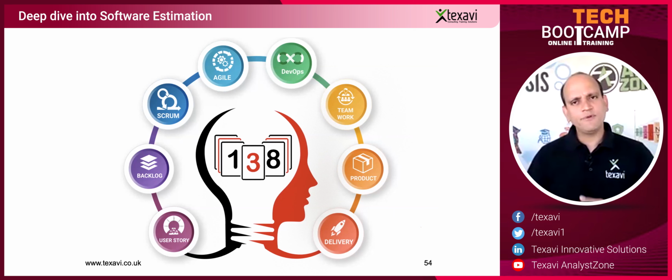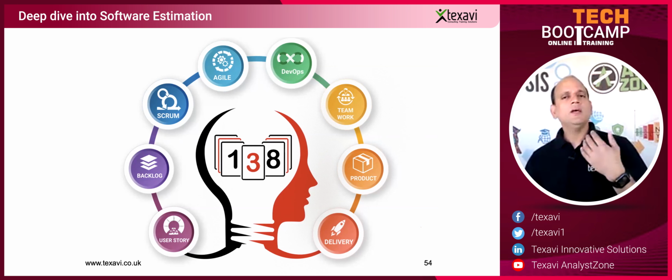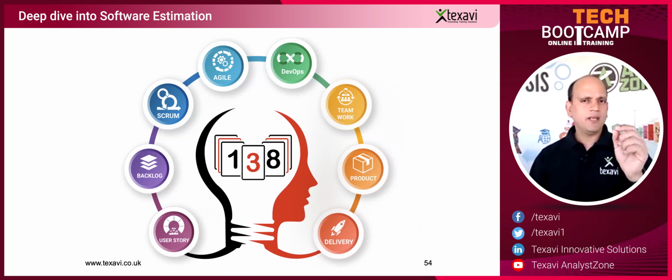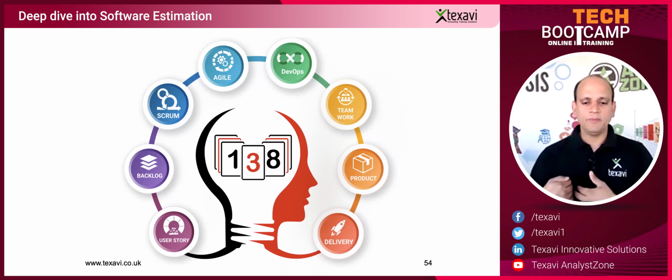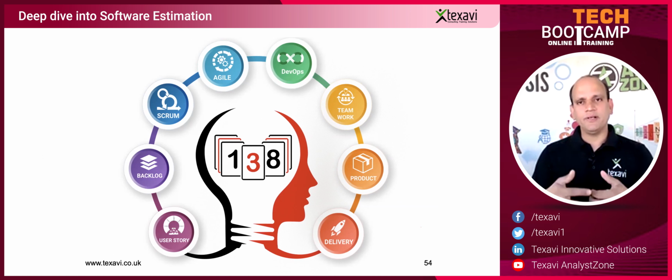As we discussed yesterday, you don't have to deliver all the e-commerce website functionality in 2 months or in 6 months. You can actually have one functionality done, and then you say, hey, by the way, I've got the catalog. You can have a look at all the items that I'm selling. You can actually select the items, create your own shopping cart. And then once that is done, you cannot obviously pay, but you can send that in an email to me. I'll look after the items that you bought. Still that works. There might be offline work involved, but still the customer can do something there. That's the potentially shippable product you're delivering quicker.